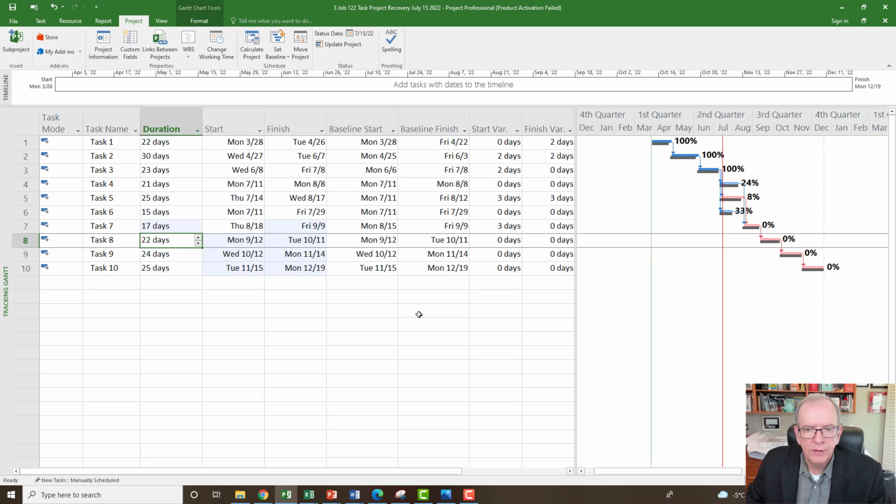Again, there's a lot of different ways that you can go to get that time back, and I was explaining them in my previous videos. This is more just showing you the timelines and the updating process of getting it back on track. So this becomes the recovery. Now you can guess, I would save that, and then this is the file I'm going to use as my plan for the next month for what I'm following along with, because the dates are slightly changed and this is moved back and this is shortened.